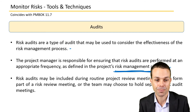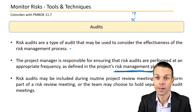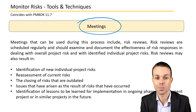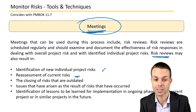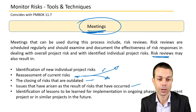Risk audits may be included during routine review meetings — for example, in Agile, a retrospective. We could ask: is risk traveling well? Is it not traveling well? And then we can put that back into our process and improve as we go along. Or the team may choose to hold separate risk audit meetings. That brings us to meetings, which ties a lot of these things together. Risk review meetings may result in identification of new project risks, reassessment of current risks — maybe they've been brought under control or are going out of control — the closing of risks that are now outdated, any issues that have occurred, and identification of lessons for our lessons learned register.